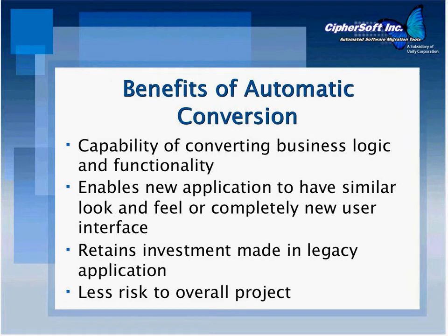They had allocated about 65 man-years to manually convert their application. They had started that process, had gotten very frustrated with it, and purchased our services to do the conversion for them. We were able to do that conversion project in about 10 months with about 2.5 people.